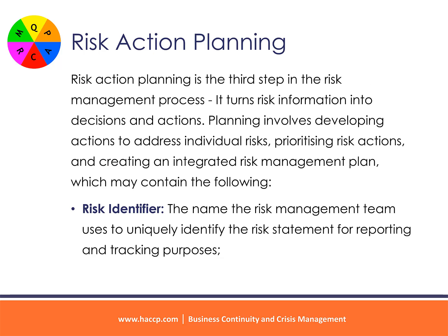Risk action planning. Risk action planning is the third step in the risk management process. It turns risk information into decisions and actions. Planning involves developing actions to address individual risks, prioritizing risk actions, and creating an integrated risk management plan, which may contain the following: risk identifier, the name the risk management team uses to uniquely identify the risk statement for reporting and tracking purposes.